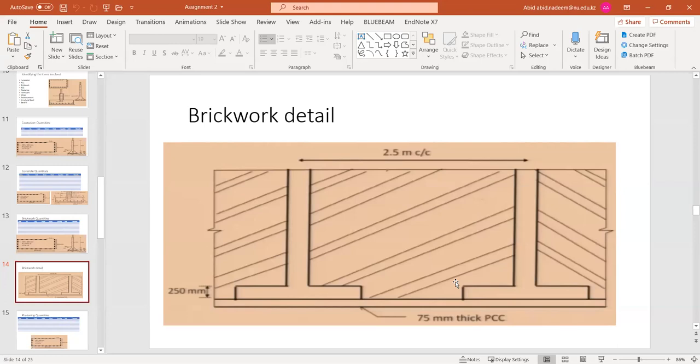And the other thing is the physical constraint as well. Physical constraint means the congestion of the work, okay? That means if we start both these areas simultaneously, then the work site will become very congested in that case. So considering these physical constraints,